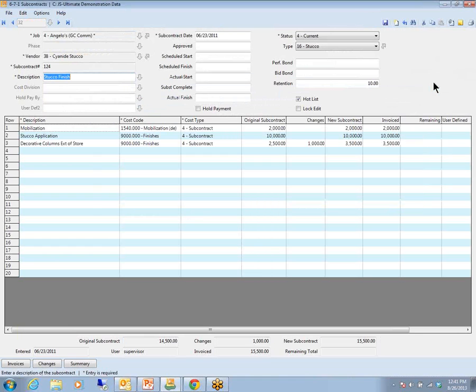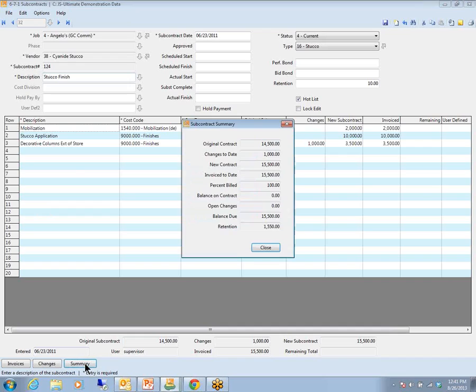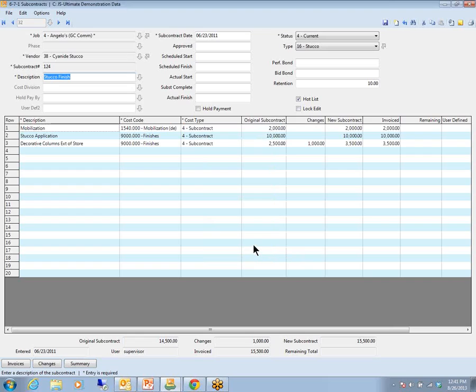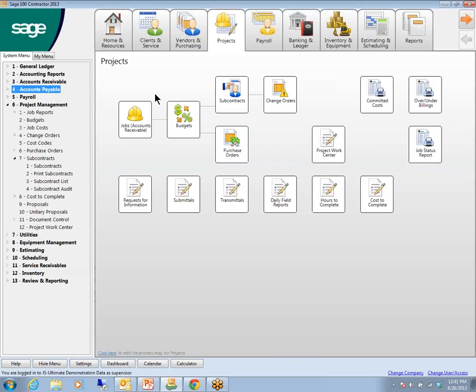In terms of efficiency gain for our contractors, we do that by tying all this together and being able to provide them things like, hey, how about a contract summary? I want to know where I'm at to date on this subcontract. Being able to have the cost controls in place to where I know what my percent of completion is with this sub. Not only know what approved change orders are on this subcontractor, but my open ones. So at any rate, we're able to go ahead and truly manage our vendors just the way I think you would hope us to be able to do.